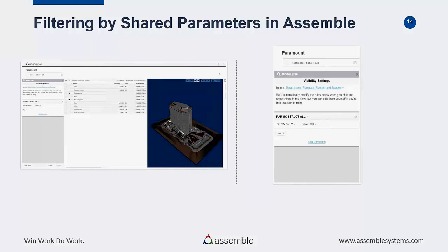This is one of those filtered views that we put in basically every one of our projects right at the start, so that our estimators and pre-construction managers can go through, and as they classify the items, as long as they check off that taken off box, the items will disappear off the screen. There can be multiple people working in that view at the same time on their own machines, and things will be disappearing off each of their computers every time they refresh.